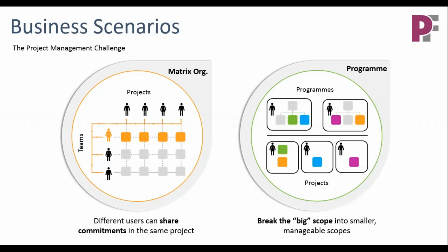In each case, there are certain drawbacks to the built-in capabilities, and we don't really want to get into those. What we do find is that overall these capabilities are rarely used. And certainly when we have direct task dependencies built in using the standard capabilities, we face the issue that an event happening in another project that I place the dependency on, if that event moves, will potentially move the dependent tasks in my own project out. So there are these hard links that people find a challenge.